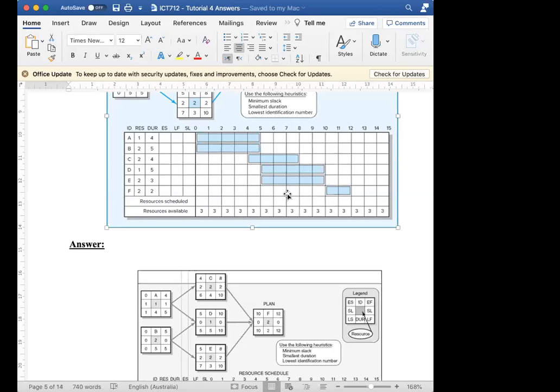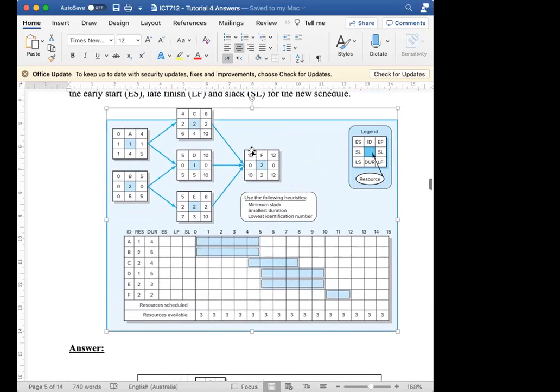First of all, why have we done D? Because this is a critical part, the 0 slack. So why have we done C instead of doing E? Because of the early start day. Actually, personally, I think they can be interchanged, whichever you start first. C or E wouldn't matter that much as long as you go with D.